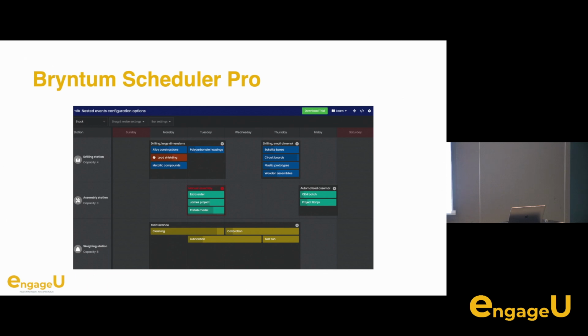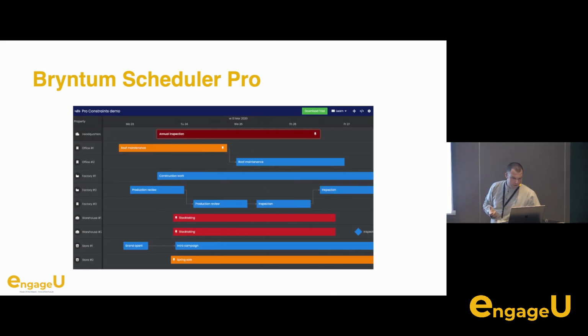So you can say to dispatch this order, you need to load it in the truck, to generate a delivery note and invoice, and all those tasks are combined into completing a parent task, for example. We also have this one that you can visualize the constraints. So this constraint says that to start doing this, you need to do this first. And what this helps us with, we'll cover it when I explain the use case.